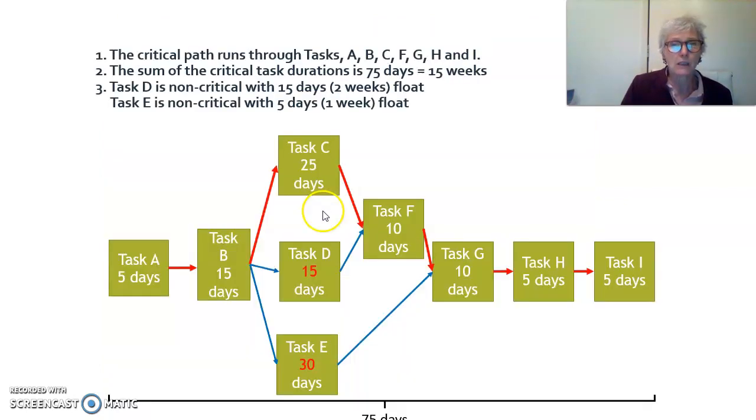Let's have a look at the critical path. So we can see here the tasks grouped together. C, D, and E are more or less in the same situation, and the red arrows show you that this is the critical path. We need task C, which is programming. We need that one first to be able to go to task F. The whole project takes 75 days. So the critical path analysis is an analysis as the one in this example.